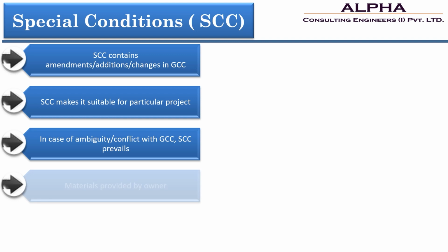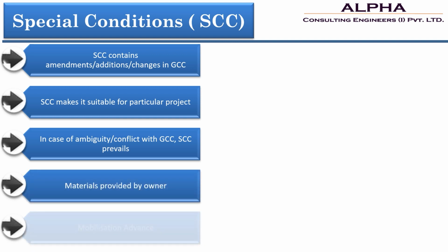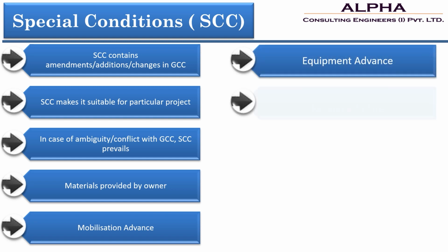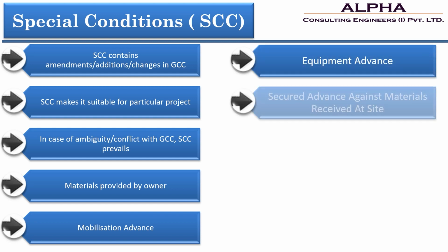Material provided by the owner, mobilization advance, equipment advance, these sort of clauses also differ from package to package. They need to be covered under special conditions of contract.